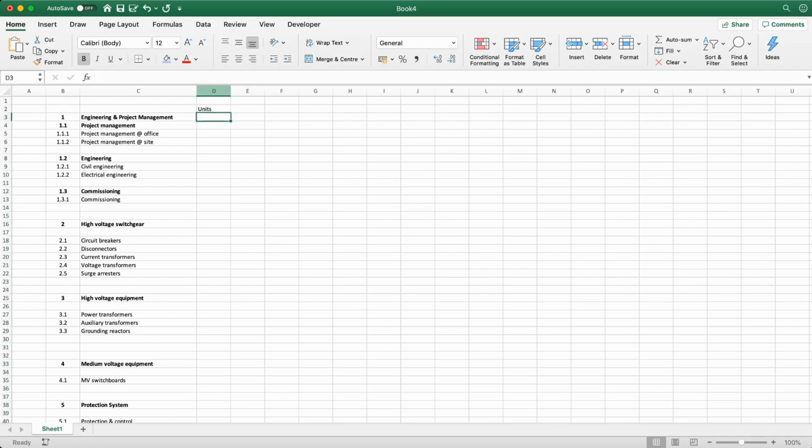So regardless of the item, you always have to select the units and then the quantities. Because we need to know where's the potato, where's the orange, so we need to follow a structure where you show the units and the quantities for each item. Afterwards, we have the unitary cost. So each item should have a unitary cost and a total cost. Usually, of course, the total cost is a calculated column based on the quantities and the unitary cost.